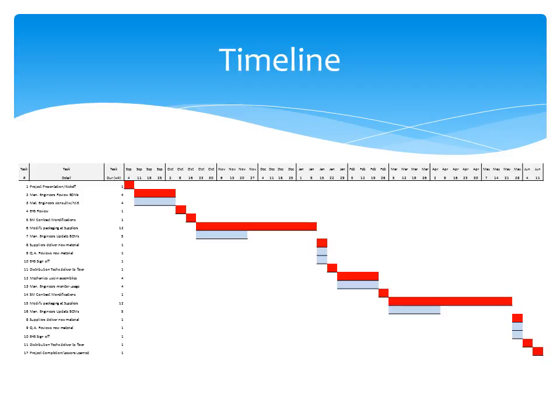The task duration is in the third column, and the modification of the packaging itself at the suppliers takes about 12 weeks. After suppliers deliver the product, it's reviewed by EHS and signed off and delivered to the floor, at which point every product is reviewed to make sure that the packaging is in fact right size for its application. And then we've added an additional iteration of that process starting in January of 2018 and lasting till June of 2018.